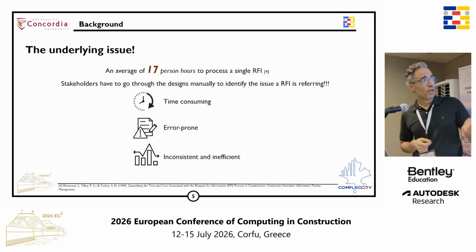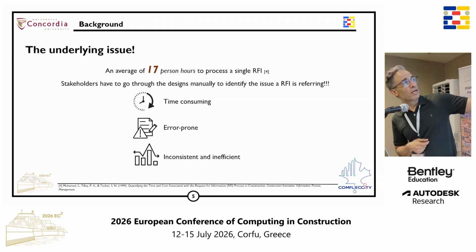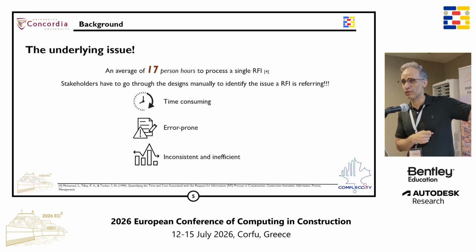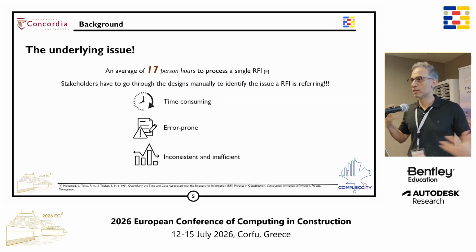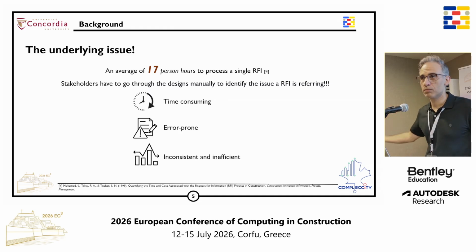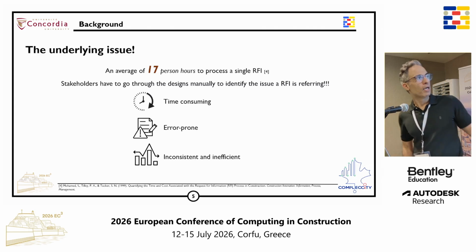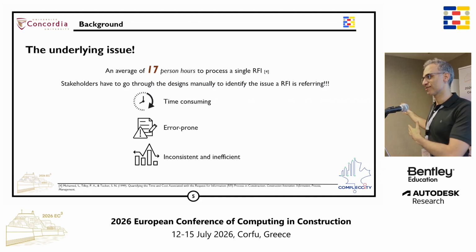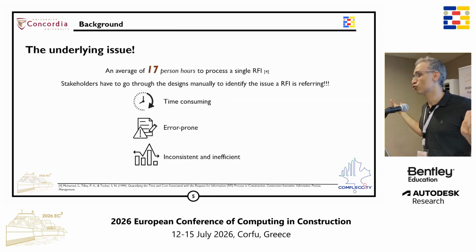The study showed it takes 17 person-hours on average to process an RFI. The study is a little bit old, it's from 2000. Of course, these days things are easier. Many projects have digital basic information. It's easier to query data in general. However, I won't be shocked if the number is still double digit, and it really shouldn't take that much for people to receive a request, file it, get the answer, done. It shouldn't take 17.